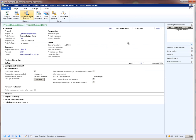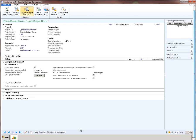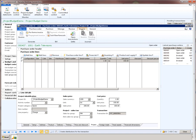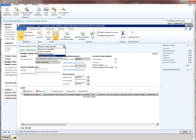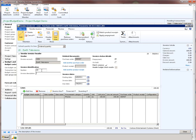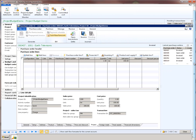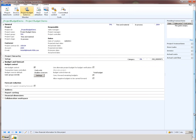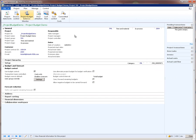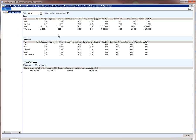We don't see anything in the revenue section because we did not do any revenue budgets, so this looks good. Now let's go back to the purchase order and invoice it. We will say generate invoice, select ordered quantity, specify an invoice number, and then post. The invoice is now posted. Let's close this purchase order. Back on the project budget balance form, we see the $100 commitment has converted into $100 actuals, and the remaining budget is still $14,900, which is correct.